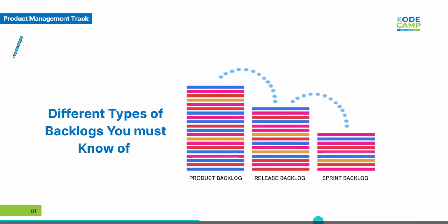Now, what you do at this point is you go to the product backlog and select the items needed to achieve that goal. You're not trying to rewrite everything afresh anymore because you already have it on your backlog. So what you're doing is just selecting the things that your company mentioned, which is this version should be able to support card payment. It should be able to have an improvement. Now you already have these things on your backlog. What you do is just go there and select them, right? You create a release backlog.